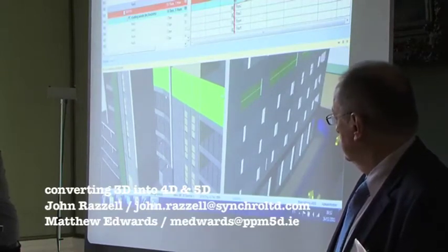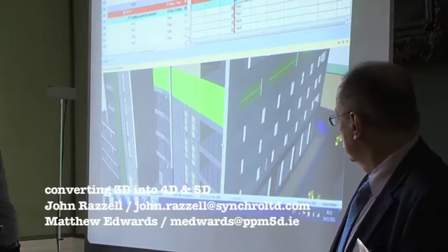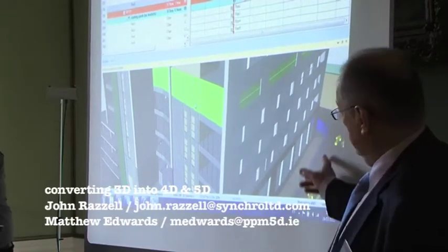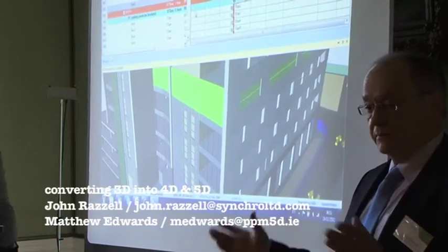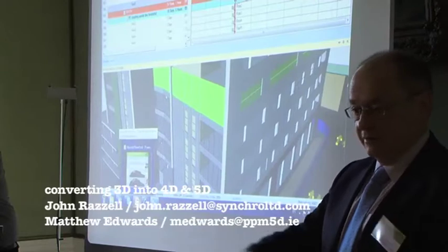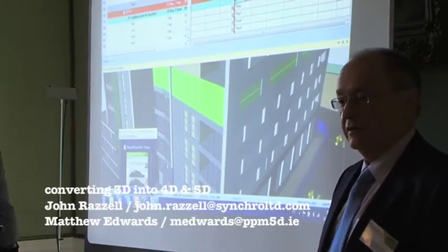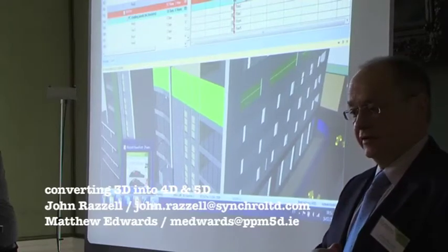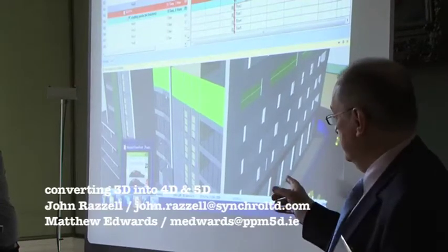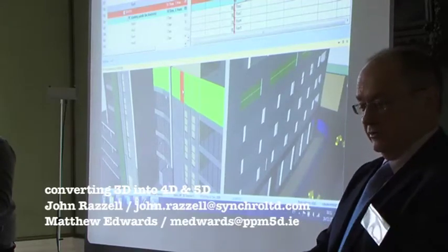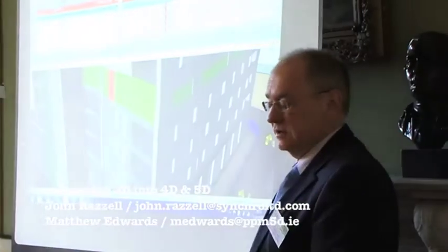As you see here, there's some arrows. It's very handy for doing a plan to show the local authority. This is how we're going to bring all our lorries in, how we're going to bring stuff moved around. And we've just developed a process called Pathfinder, where we can move items. As you see, we're bringing a crane, and it's at that point, and then when it goes to another task, we move it to that task.